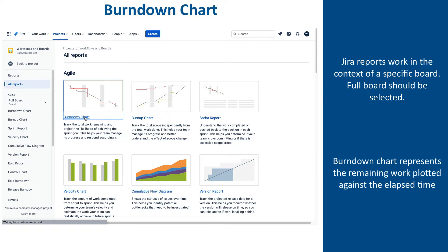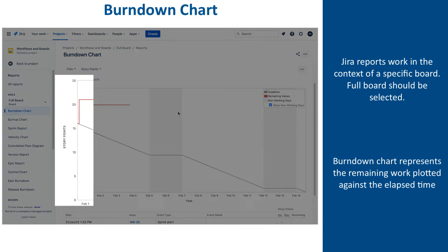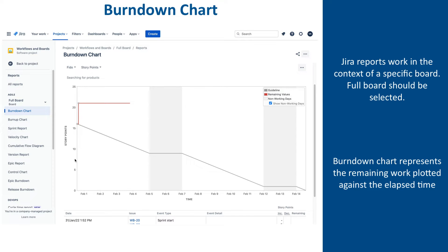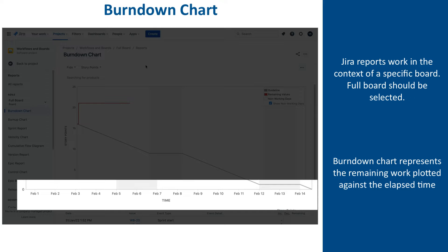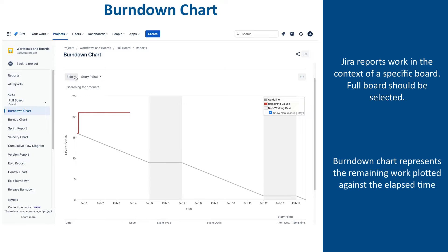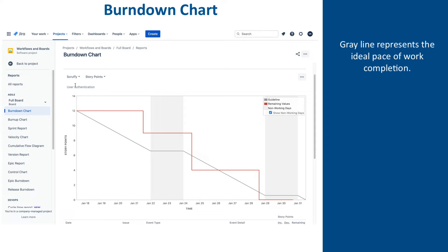The burndown chart represents the remaining work plotted against the elapsed time. The vertical axis indicates the remaining work expressed in either story points, issue count, or original time estimate, which can be selected from this drop-down. The horizontal axis represents the timeline of the selected sprint, and you can switch between multiple sprints using the drop-down. There are two key elements to be aware of. First, the gray line dropping from left to right is the guideline, and it represents the ideal pace the work should be completed at.